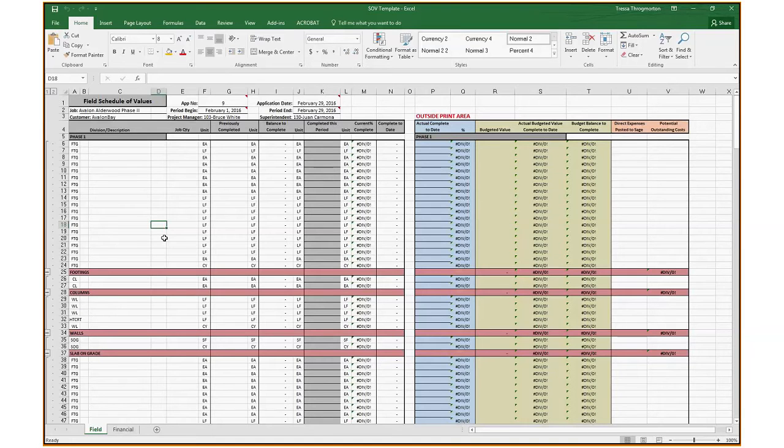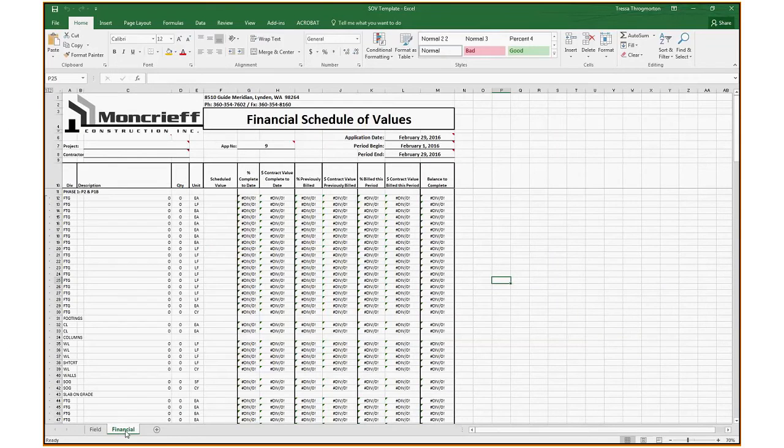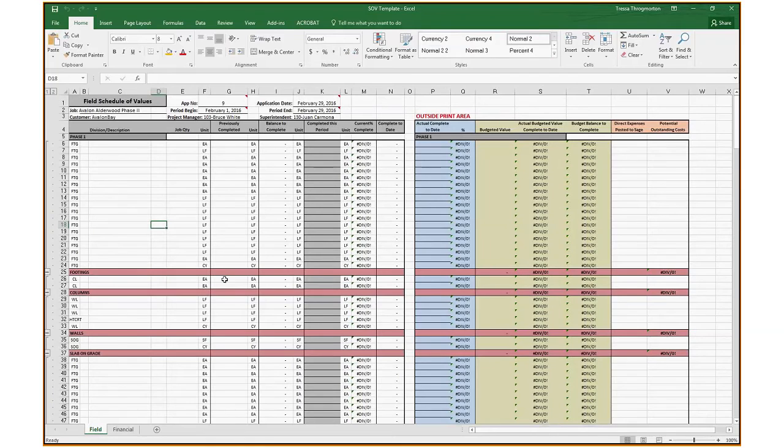Once the schedule of values is completed and ready for billing, because all the line items will tie into this financial schedule of values line by line, the accounts receivable will send out a note, typically a week before billing is due, to all the project managers, giving them notification of when each of their projects have to be billed for. So ideally the day before the billing is due, the project manager will come in and enter values in this period.